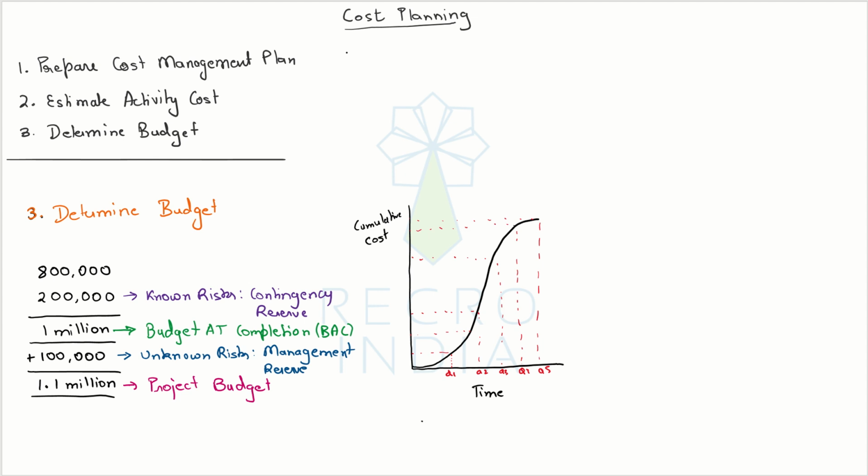So you have to take that feedback, go back to your drawing board, adjust some of the activities, maybe move some of the activities back and forth, make sure that your periodic funding requirement doesn't exceed the funding limits imposed by the sponsors. And after doing the adjustments, you might have to redo the whole graph. And let's say this time the chart looks something like this. And hopefully this time you should get the approval,